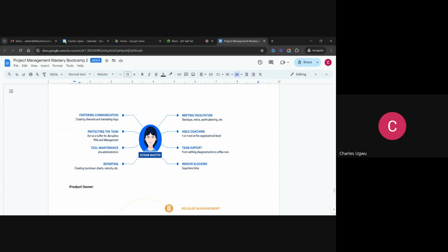So that is the way to manage risk in an agile environment. That is the best risk management, because with this daily meeting, we capture risk at an early stage and resolve and mitigate it. But in waterfall, where the team meets once every week for a review meeting, you find out that it might be late when they capture a risk. But in Scrum, they do that every day. That is the first thing the team will do before they start their work, having the daily stand-up. And like I said, this daily stand-up is a must.